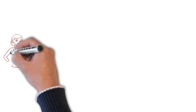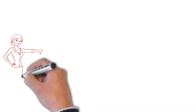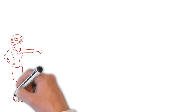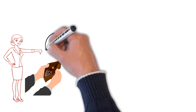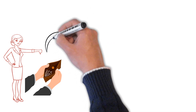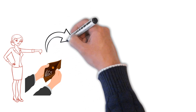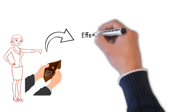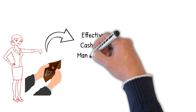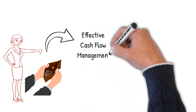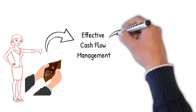One of the most common reasons companies go out of business is because they simply run out of cash. Construction businesses often must front much of their project's costs before sending out the first invoice, so they can be especially vulnerable to this if cash flow is not managed in a smart way. That's why effective cash flow management is so important for construction companies.